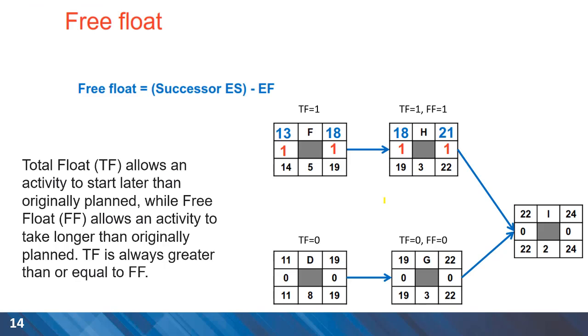Another concept is free float. For any activities such as H, we look at the early start time of the successor, which is I, so 22 days. And the early finish date of the activity itself, activity H, has early finish of 21 days, so the free float is one unit of time in here.